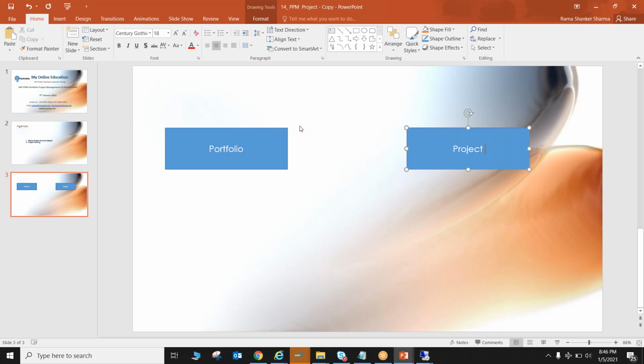No. What I'm saying is, if you want to use the same project profile, let's say project profile code CPR 0001, you don't want to go for enhancement, and as per your business requirement you need only one project profile. In that case, you change the description of that project profile, enter all the default values in it, and use that.